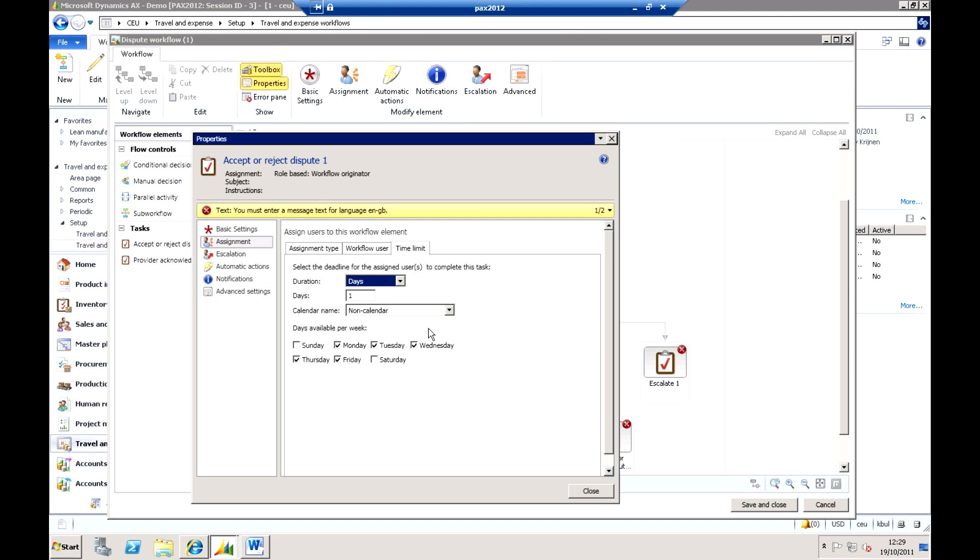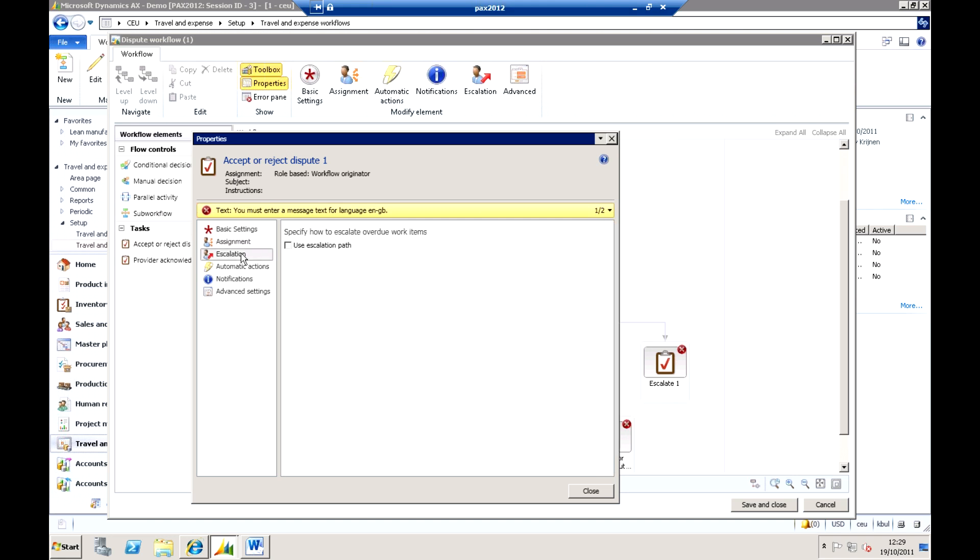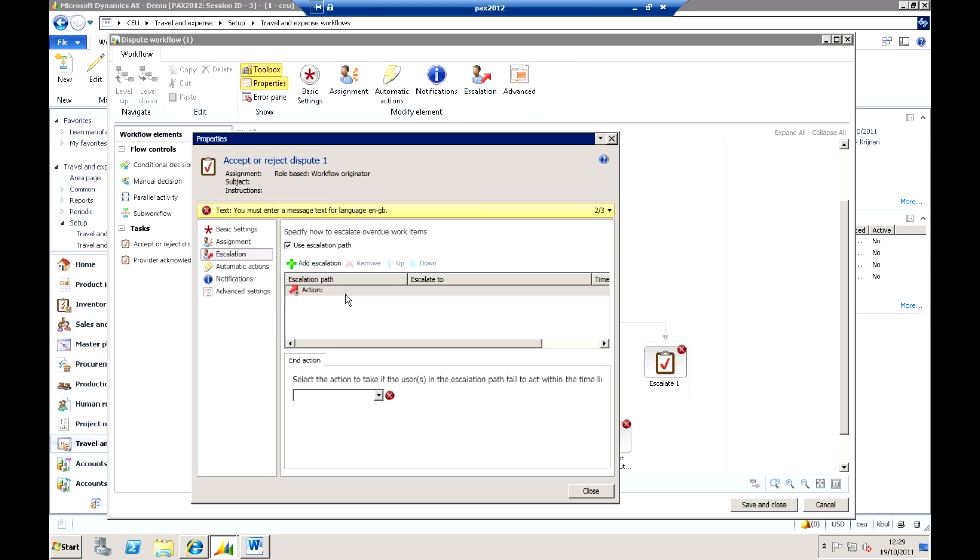So how long is it going to take to complete, how long do we want to allow them to have this task open. I can specify the number of days - it's a little bit mean here we're only allowing one day but you can see the sort of thing we can do. If it's not completed within one day I can then define an escalation path. This is escalating up through levels of management essentially at this point to say who needs to get involved.